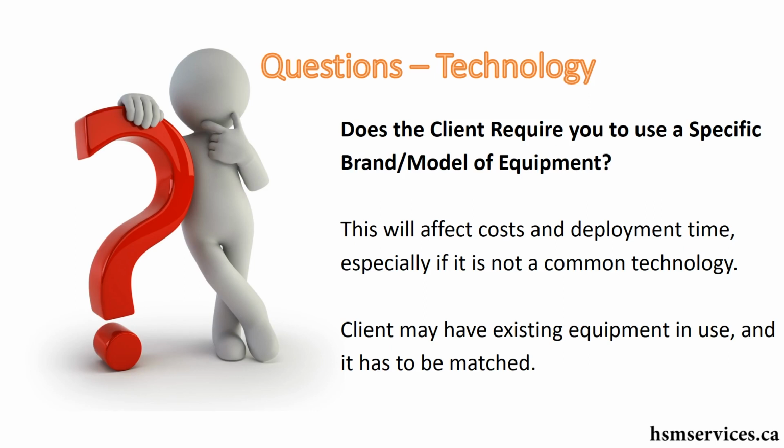Sometimes a client hires an outside consultant who figures out what they need, especially, let's say, a government agency. A government agency may have gone to an IT consultant, and the consultant says, hey, based on your needs, this is the system that you need to install. And then the government agency goes back and puts out an RFP and tries to get some bids on their system. And obviously this is going to affect costs and deployment times. I had a client who not only insisted on the exact type of access point, they spec'd it down right to the brand of cable that they wanted to run in the walls.